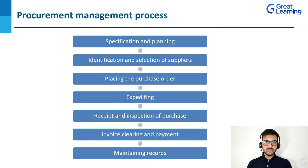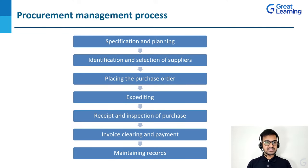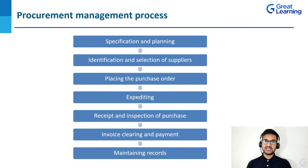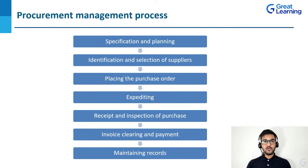These are the steps involved in the procurement management process. We start with specification and planning — planning what exactly is the product or service that we need, what exactly are the specifications of that product. Then identification and selection of suppliers — identifying different suppliers and selecting the best by understanding their pros and cons. Then placing the purchase order, followed by expediting, then receipt and inspection of purchase, then invoice clearing and payment, and finally maintaining records for future projects.